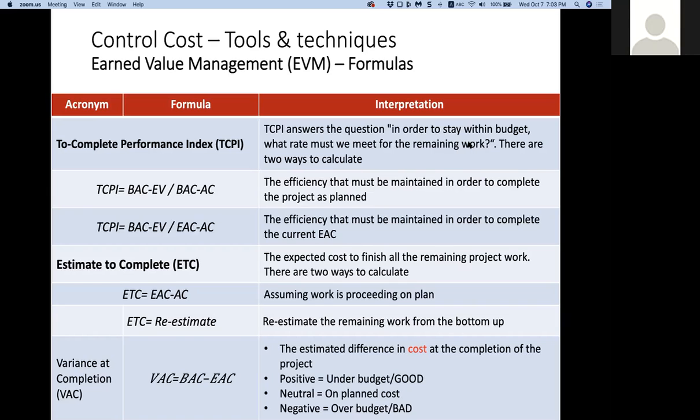اوكي اعطيني اكزامبل مثلا طلعت عندي تي سي بي اي عندي بادجت $100,000 صرفت لحديت اليوم منه 20,000. اوكي وبدي ضلني محافظ على البادجت $100,000 ما بدي اتخطى البادجت بس لحديت اليوم مبين عندي انه كان لازم اصرف 10,000 صارف 20,000 يعني اذا بكفي بهالوتيره رح اطلع فوق $100,000. هون عم بسال السؤال كيف لازم انا ارجع اشتغل على البروجكت من حيث الكوست شو هو الريت تبعي من حيث الكوست لضلني يصيب $100,000 ما اتخطى $100,000.